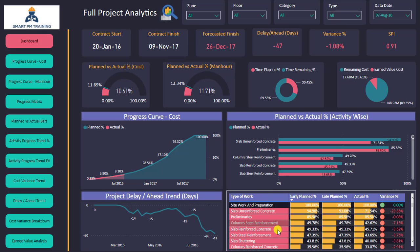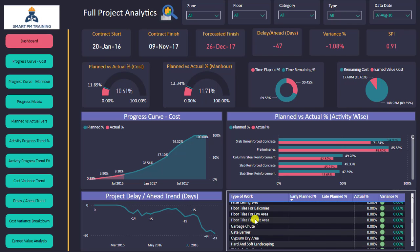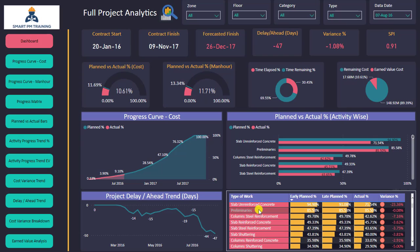This is my progress matrix. I have the list of activities, the planned percentages as per early and late dates, the actual percentage, and the variance percentage. I can scroll down to see all activities listed in the project. Delayed activities are highlighted in red, and I have indicators to tell me whether an activity is in delay.